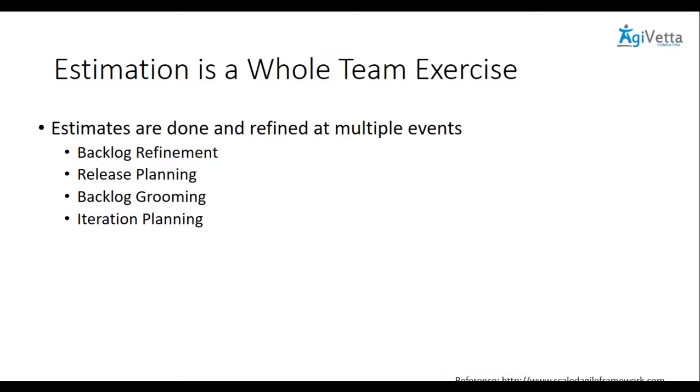And it is essential for the product owner to go back, revise that estimate and the commitment, and provide it to the stakeholder, not keep it with him or her. The team can change it again whenever it happens. That's the agility. You get feedback, you get an estimate from the team. Take estimates from multiple teams, multiple product owners taking estimates from multiple teams. Combine it all. You are in a position to provide a much better estimate at the end of this exercise.